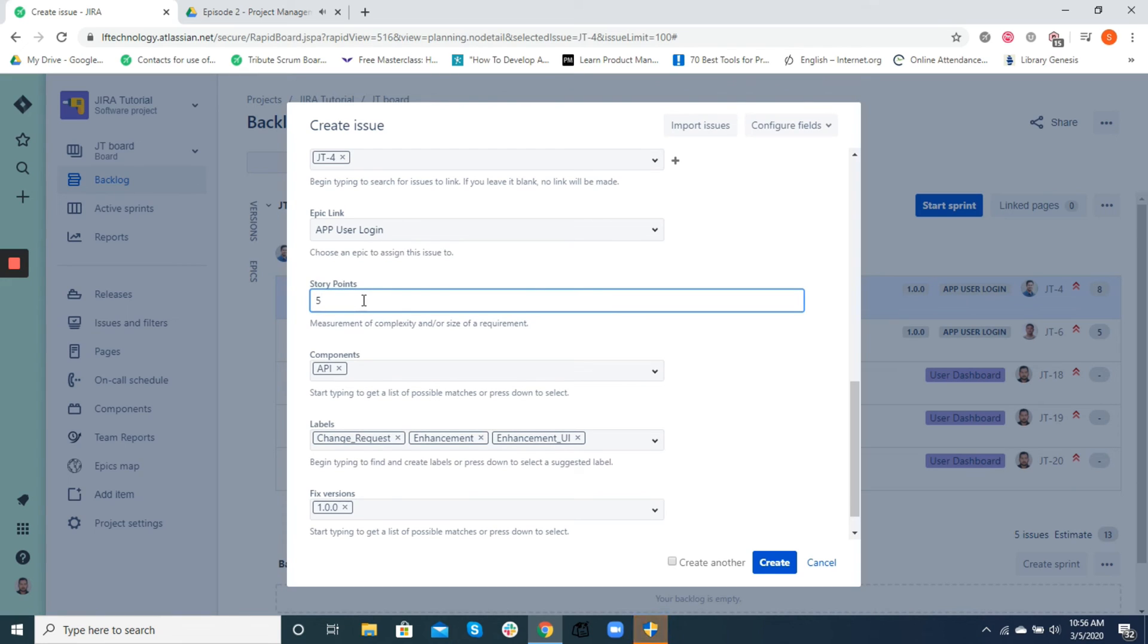During the backlog grooming and sprint planning sessions, the development team uses poker planning technique to come up with a unanimously agreed story point for their tasks. For a given sprint, the sum of these story points will be the forecasted velocity that the team commits to undertake.